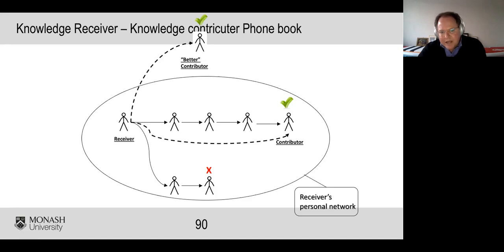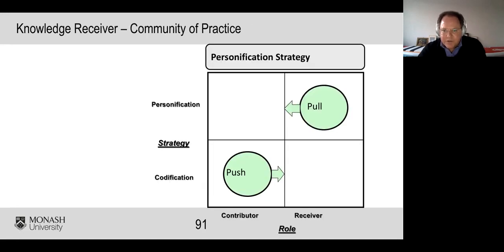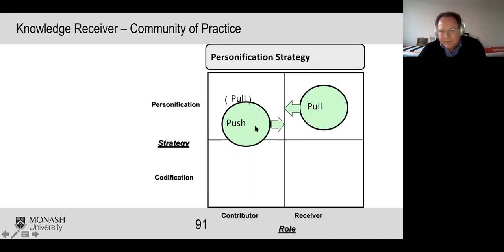So we tried to address it as well, and that was the personification point. We pulled the publisher of the reports, or a senior person that had worked on similar projects, into a process meeting, a briefing before initiating a project, to brief how they had approached it in the past, explain their way of codification or how they structured their reports, and map out who the people working there are.